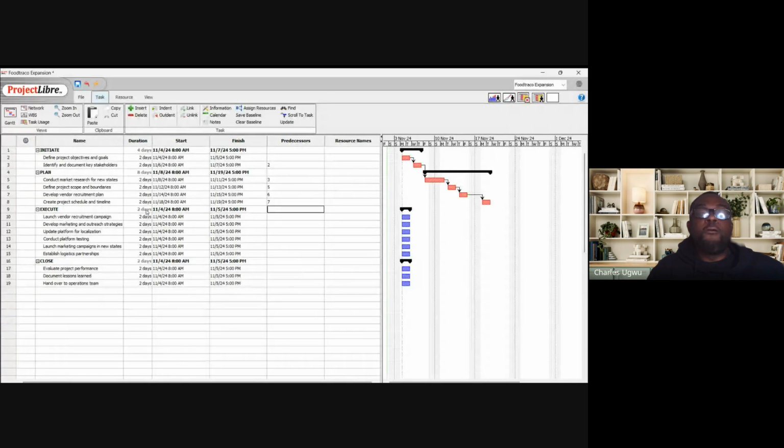If we get to this execute stage, we can start launching the vendor recruitment campaign immediately we finish creating the project schedule and timeline. So once we've done this, we move to the execute stage. The first item in the execute stage, which is number 10, is going to start after number 8. So come over here, we write number 8.